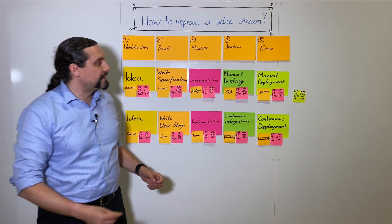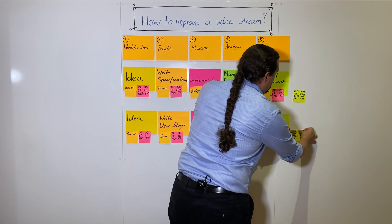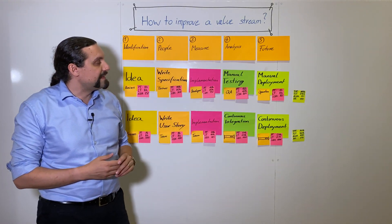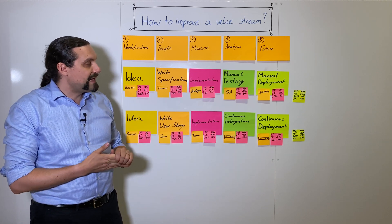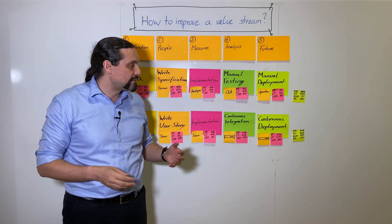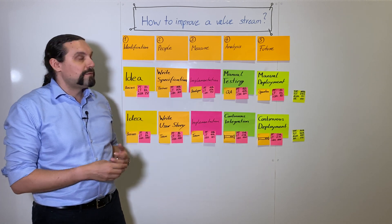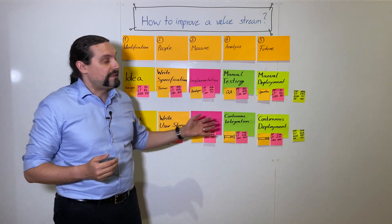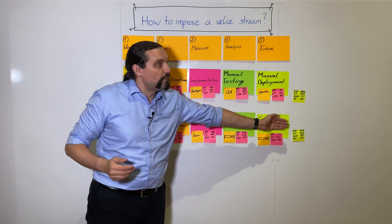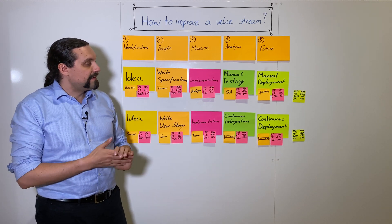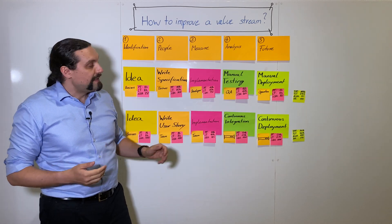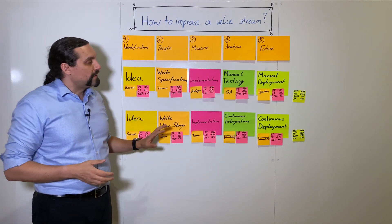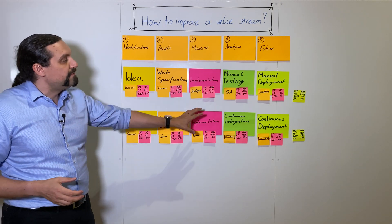Now again we are going to analyze the totals. We see that we have a total process time of 36.2 hours, a total lead time of 56.2 hours, a rolling complete and accuracy of 80 percent — meaning 80 percent of ideas will go directly into production — and the activity ratio is at 64 percent. So this will be our target value stream where we want to go.